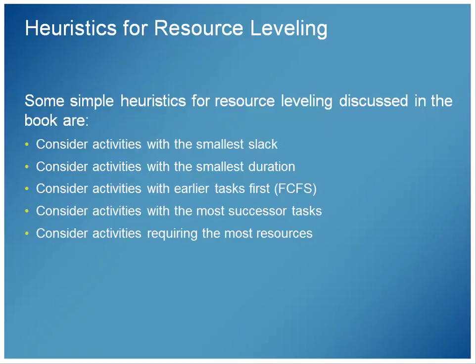Activities with the most successor tasks. Activities that require the most resources. You may want to dedicate resources or move tasks that direction. For example, that first rule, prioritizing activities with the smallest slack. That's good for minimizing slippage.